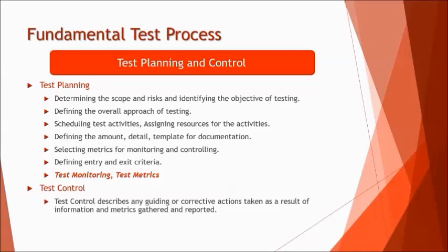And it's not mandatory that the planning would go as per what you have planned, but at any point of time you can experience that the plans are getting deviated depending on the real-time statistics or the evaluation and the progress measurement. So at that point of time you basically need some corrective actions to be taken, and that we recommend should be prepared parallelly with the test planning in the beginning itself.